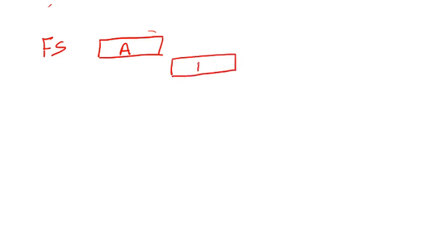The 4 major types of relationships that we have are, number 1, the finish to start relationship. Finish to start simply means that the predecessor activity must finish. So let's say this is activity A, that's the predecessor. A has to finish before the next activity will start. And this is the successor activity, that's activity B. So finish to start simply means that A must finish before B can start. This is a vivid example of what a finish to start relationship looks like.